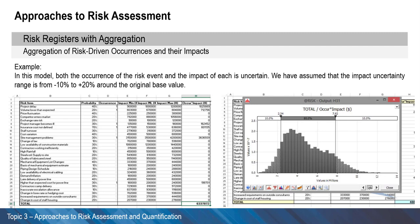A frequent mistake is to directly add the impacts of risks that have been quantified at the line-item level. The risk and impact definitions may need to be significantly modified compared to quantitative line-item or non-aggregate approaches, and generally need to be made more precise.